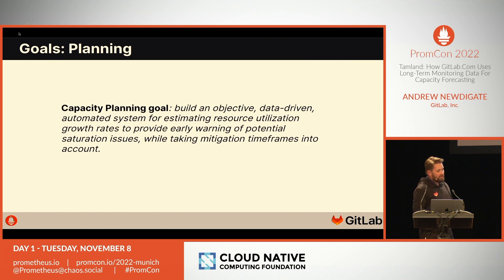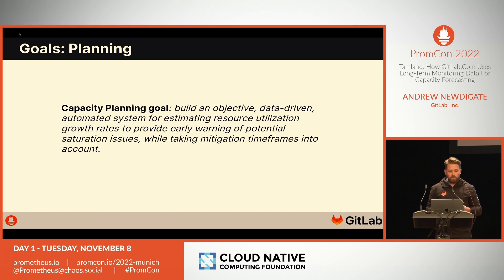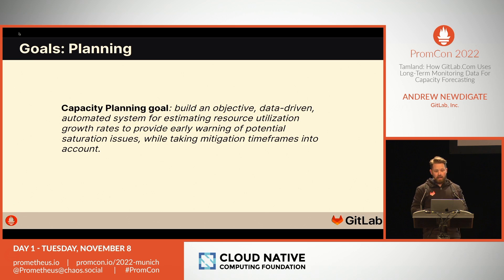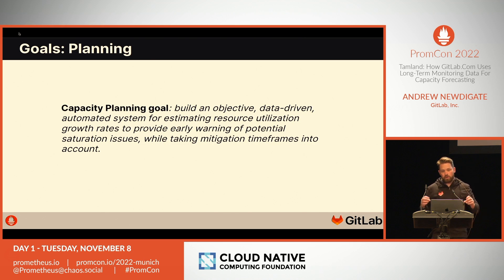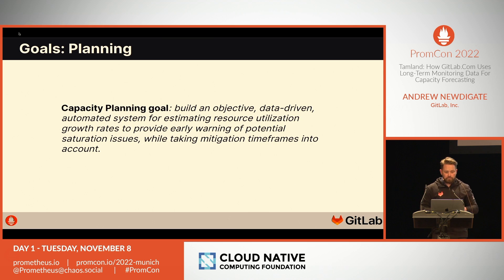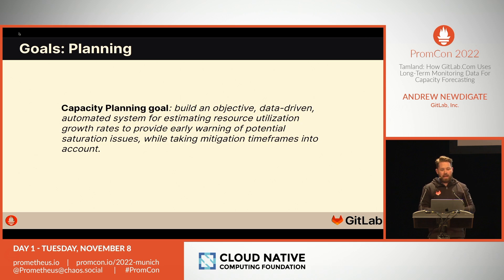The goal of our capacity planning process is to focus on resources with high risk or long mitigation times, and ensure we're keeping track of utilization and growth so we can plan ahead. We want to build an objective, data-driven approach to estimating capacity, and we want it to be automated so we can scale it to cover all resources within our system. We do this by breaking each service down into its constituent resources, forecasting growth on those resources individually, and then building a roadmap of engineering efforts prioritized according to urgency, severity, and mitigation time.